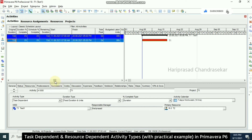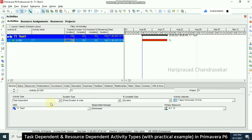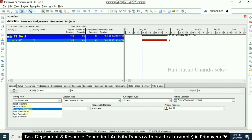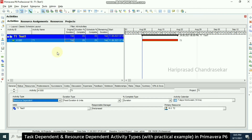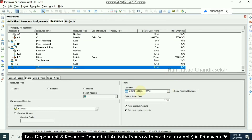Going to Schedule now we can see the result. If I change this to resource dependent it will become 14 days — before the calendar error it was only 13 days. Now this is the accurate result. It became 14 days because of the resource calendar of 5 days — 5 days times 10 hours — so to compensate, we need an excess of 4 days timeframe.